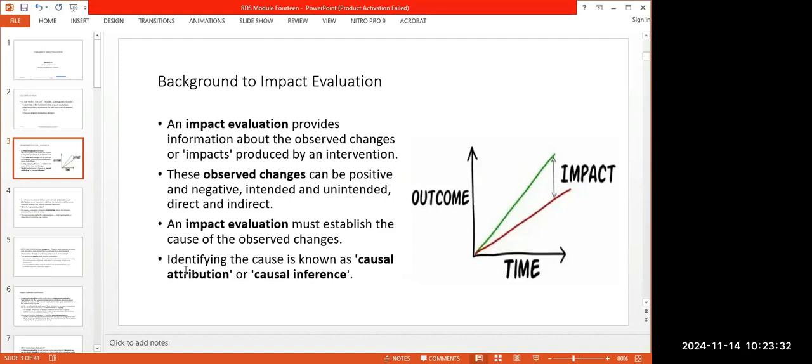You know, there are various types of evaluation, like we mentioned earlier. There is formative evaluation, the evaluation you do in order to justify an intervention. Then there is ongoing evaluation that you do just to keep tabs with the expected impact. And then there is the midterm review, which is done in the middle of the project. And later there can be another ongoing evaluation, but there will usually be a final evaluation, or sometimes they call it endline evaluation, which is done after the program is completed.